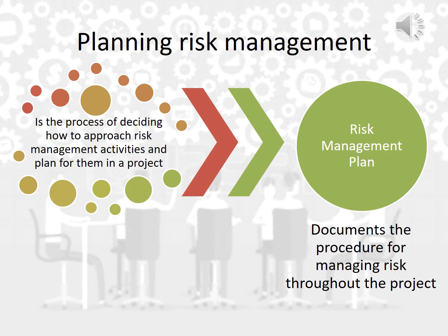During these meetings, the team should review project documents, risk management policies, risk categories, lessons learned reports from past projects, and the team should prepare a template for creating the risk management plan. It is also important to review risk tolerance for different stakeholders. As you remember, we explained that we have different categories of organizations, of people, so the stakeholders also can be categorized into the 3 categories.